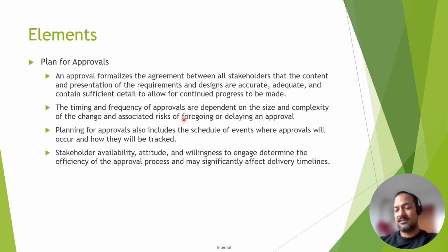So if we are getting some UX UI changes, those are just modifications, or just changing some text, or putting some icons, or changing the color. So these are small changes, so that can be minor changes. So we generally bucket the changes, like these are minor changes, these are major changes, these are minor but the complexity is high, or these are major and the complexity is low. So we try to segregate the changes based on the bucketing.